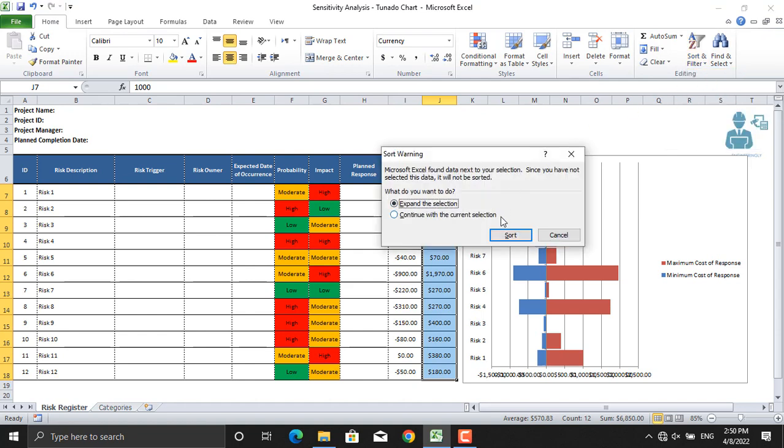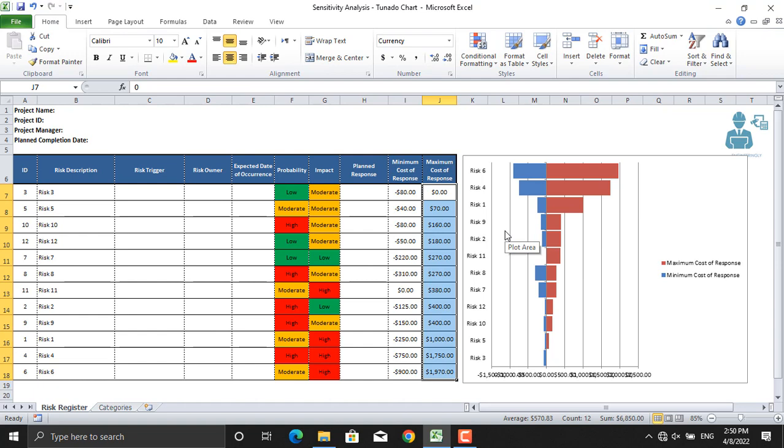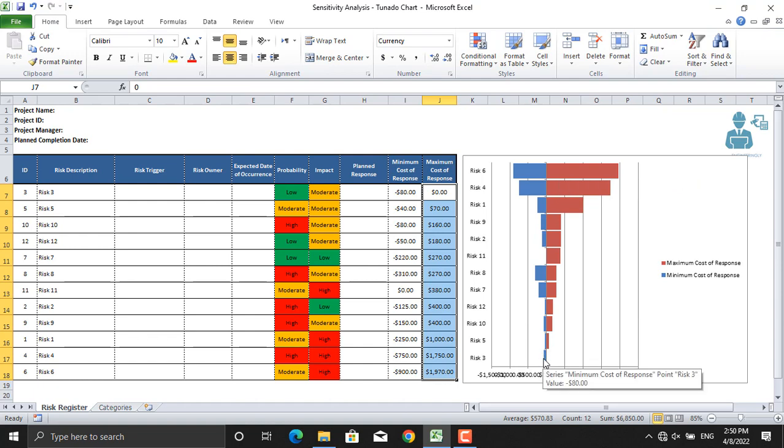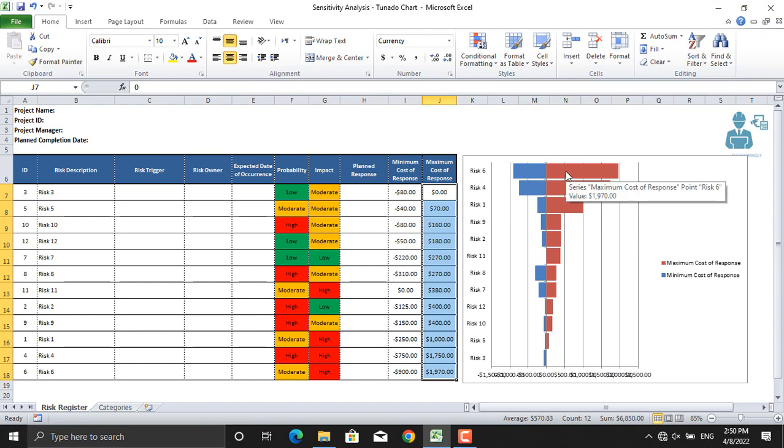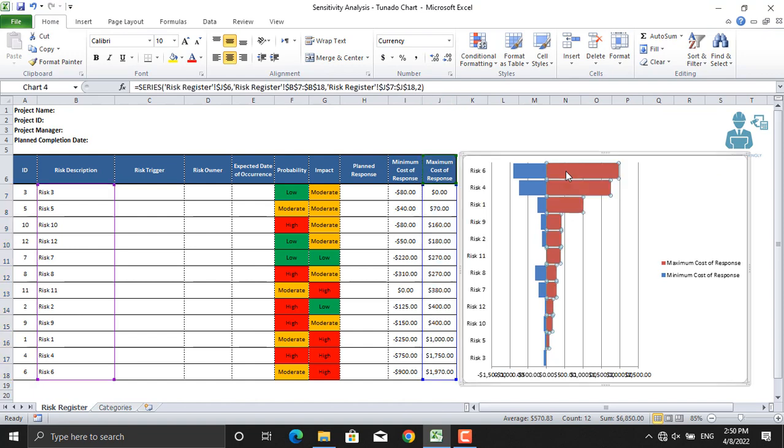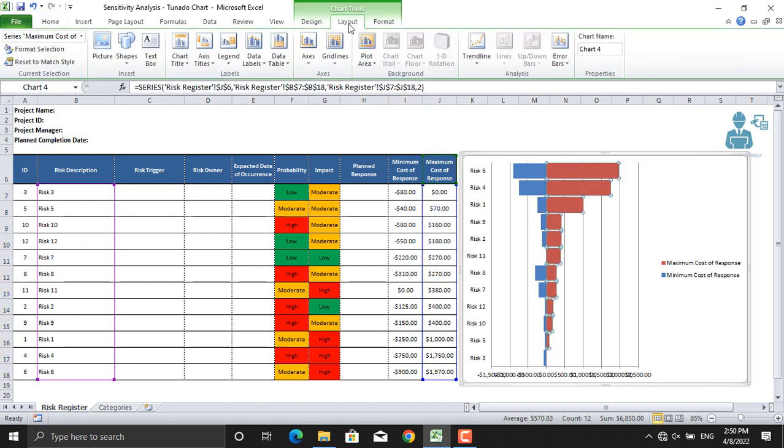As you can see, up to this point we got a tornado. The minimum value is here, and the maximum value is here. The risk with the least impact is at the base of the tornado. The risk with the highest impact is at the top of the tornado.